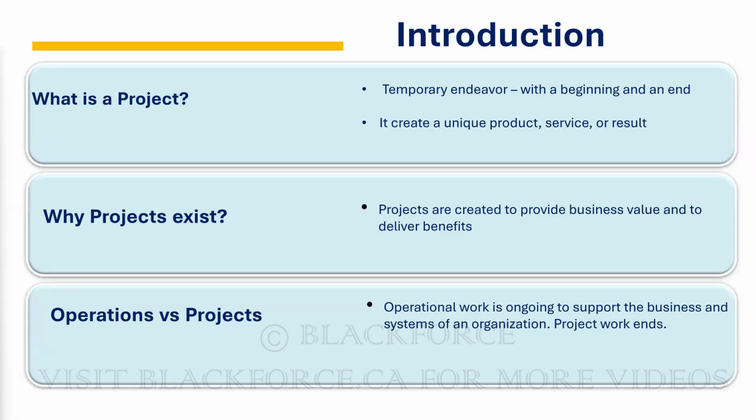But the business that requested the Salesforce, the operation, you will not transfer that project to them until it's done. When you finally implement the Salesforce, you transfer it to them. You will train them on how to use it, then they will start using it. That is when you can say your project has been successful. Do you get what I'm saying? So that's the difference between project and operations.